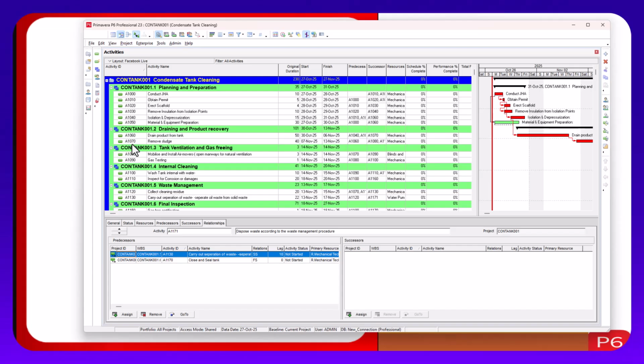So copy an existing one, rename and modify. Don't ever go into an already existing calendar and modify it, even if you're changing the calendar on that project and maybe there are some activities that have moved.